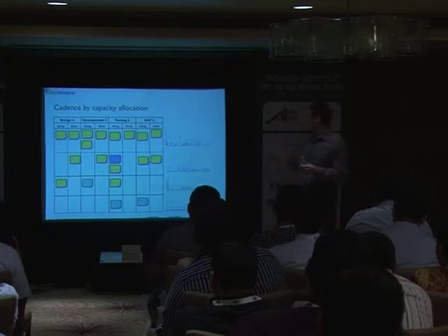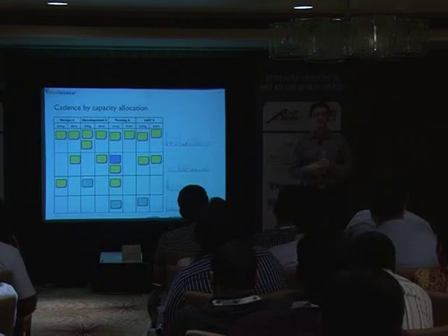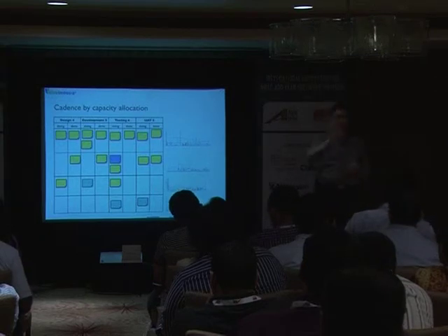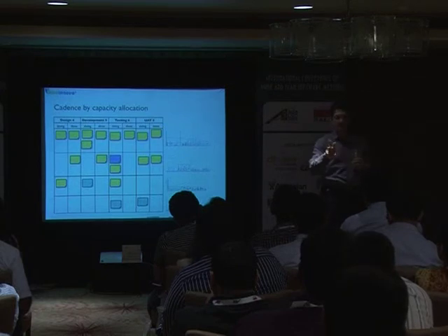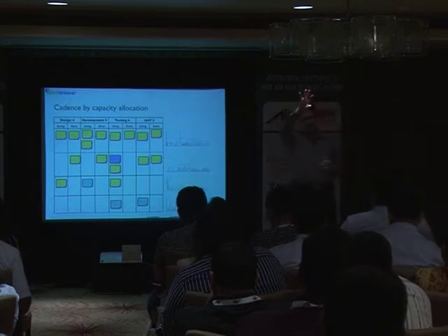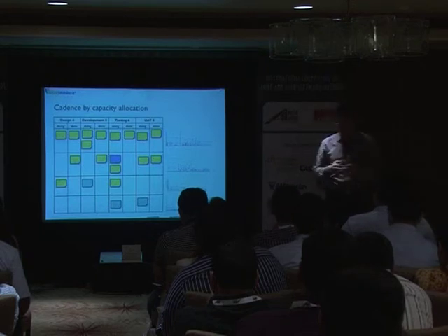You could actually have a board in which you have a doing column, and then subdivide that column in sections. And then you visualize where it is that you are within that development part. Are you doing unit testing? Are you developing test code? Is actual development going on? You know, what is happening with it?